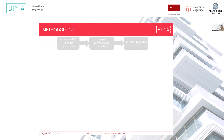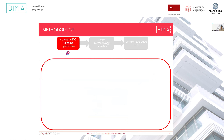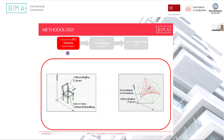Jumping to the methodology, the first step was consulting the IFC schema specification. Even though I found two entities and their attributes to define the topological relationships, no practical application was noted in defining precedence relationships beforehand. So the way I found to achieve the objective was deriving object geometry into topological relationships by a set of precedence rules that I created.